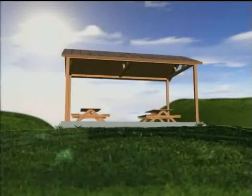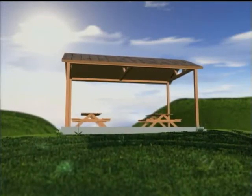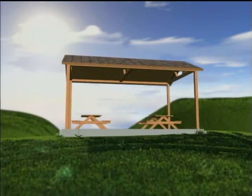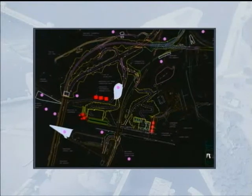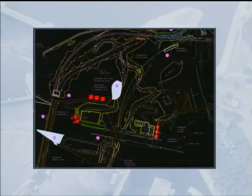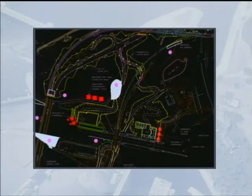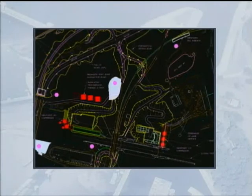A visitor center and overlook area concept was developed to permit public access for viewing of ongoing construction while maintaining separation from work activities. With lock excavation and construction access routes taking much of the available area adjacent to the new lock, construction staging and laydown areas were evaluated to optimize workspace for the various construction contracts.